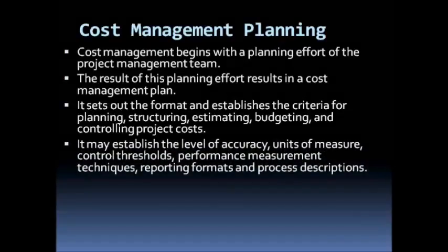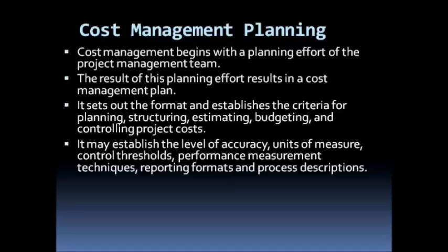In detail, the cost management plan will also establish a level of accuracy. For instance, if our cost elements will be rounded off to two decimal places, then we could also talk of the units of measure that we'll adopt on our project, maybe US dollars or the Ghana cedi. Then we'll talk of control thresholds: how much is enough, how much is too much.